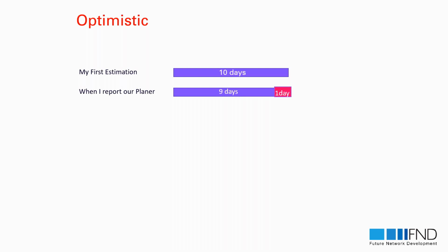And then we go to our boss or project manager, and the project manager is saying, listen, what are you talking about? What does it mean, 9 days? This is a job that you can do in 2 days, 3 days. Because his estimation is like this, he will delay anyway. If I give him 9 days, he will do it in 12 days. Better I tell him 5 days or 7 days, and he will push himself and finish in 9 days. This is pushing that you can do it in 7 days, because the boss believes that if we push 7 days, he will delay anyway, but 1 day, 2 days, in the end, I will get 9 days.